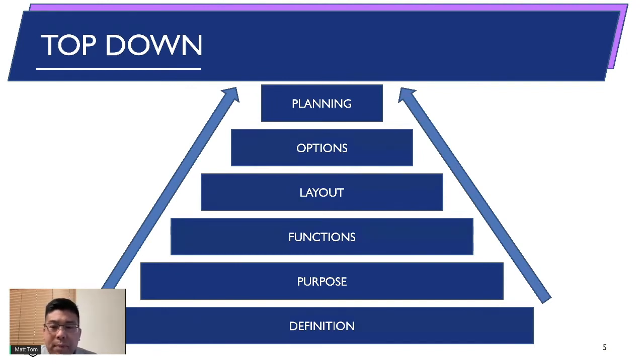And then five and six is really just to help turn that into an action plan, so to speak. So options, we're going to create weighted priority matrices to help us evaluate all of our designs and ideas. Because what we want to do is test the merit of each of those. And so you're going to have perspectives from a whole bunch of different people, from finance people to engineers to everybody else. There's just a whole bunch of different perspectives, and you want to get all of that in there, so you're going to end up with very many options. What you want to be able to do here is find the base option and then the alternates. And then from that, you'll be able to say, okay, here's the winner. Let's create our plan. This involves the Gantt charts, the critical paths, the milestones, all of those things. So this is a slide I spend a lot of time on because I think it's so important to make sure that you have all of these in place before you move any further.